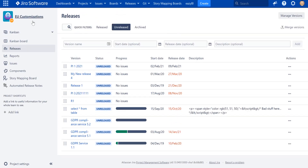Another issue is that in Jira a fixed version or release is coupled to the project, so you can only create a version in the context of a project. If you have many components owned by multiple teams, you need to track multiple versions to understand if your business functionality is done. There is no simple out-of-the-box way to track multiple versions from multiple projects in a single place and see the overall progress.